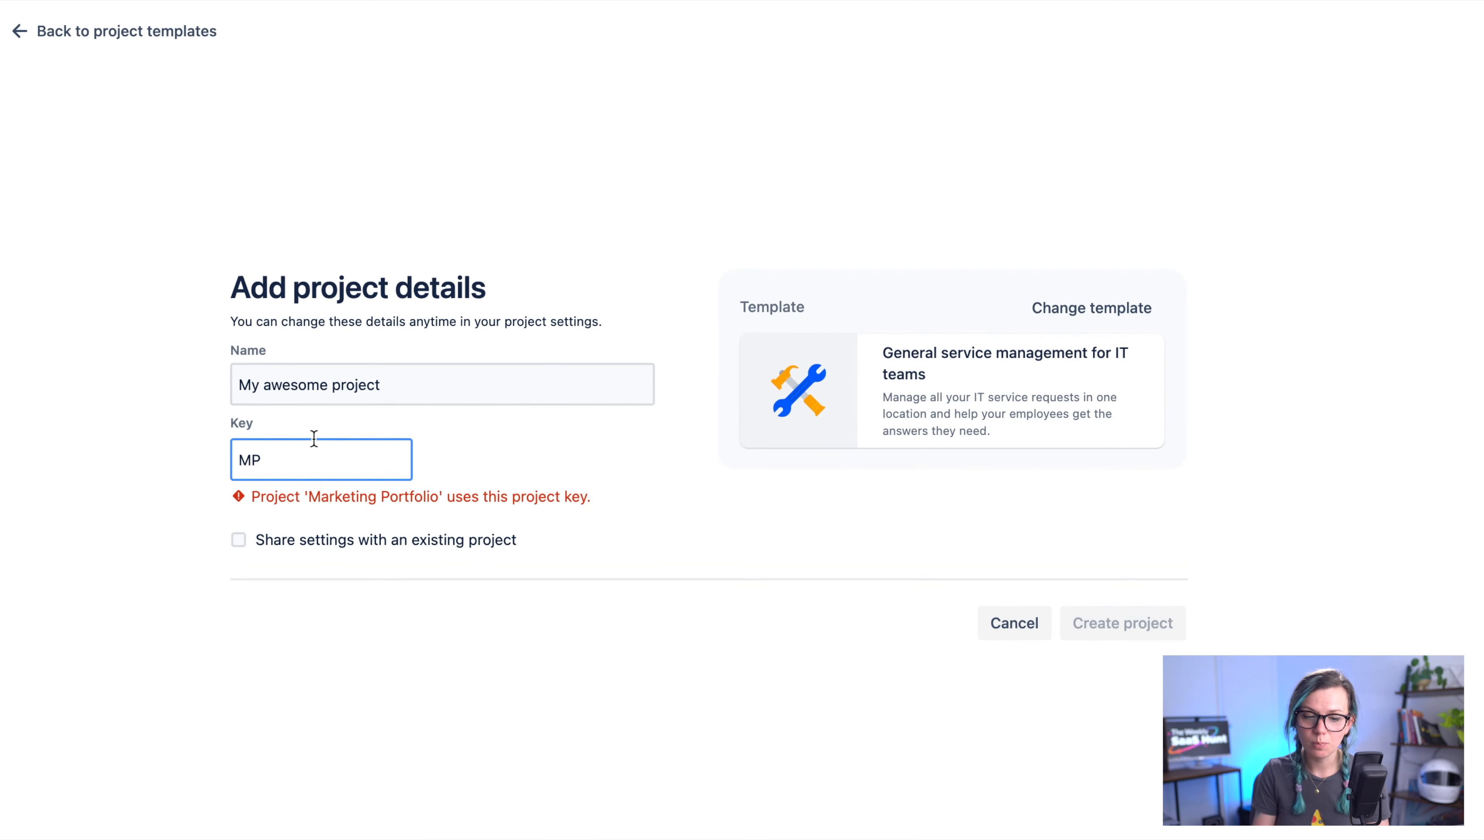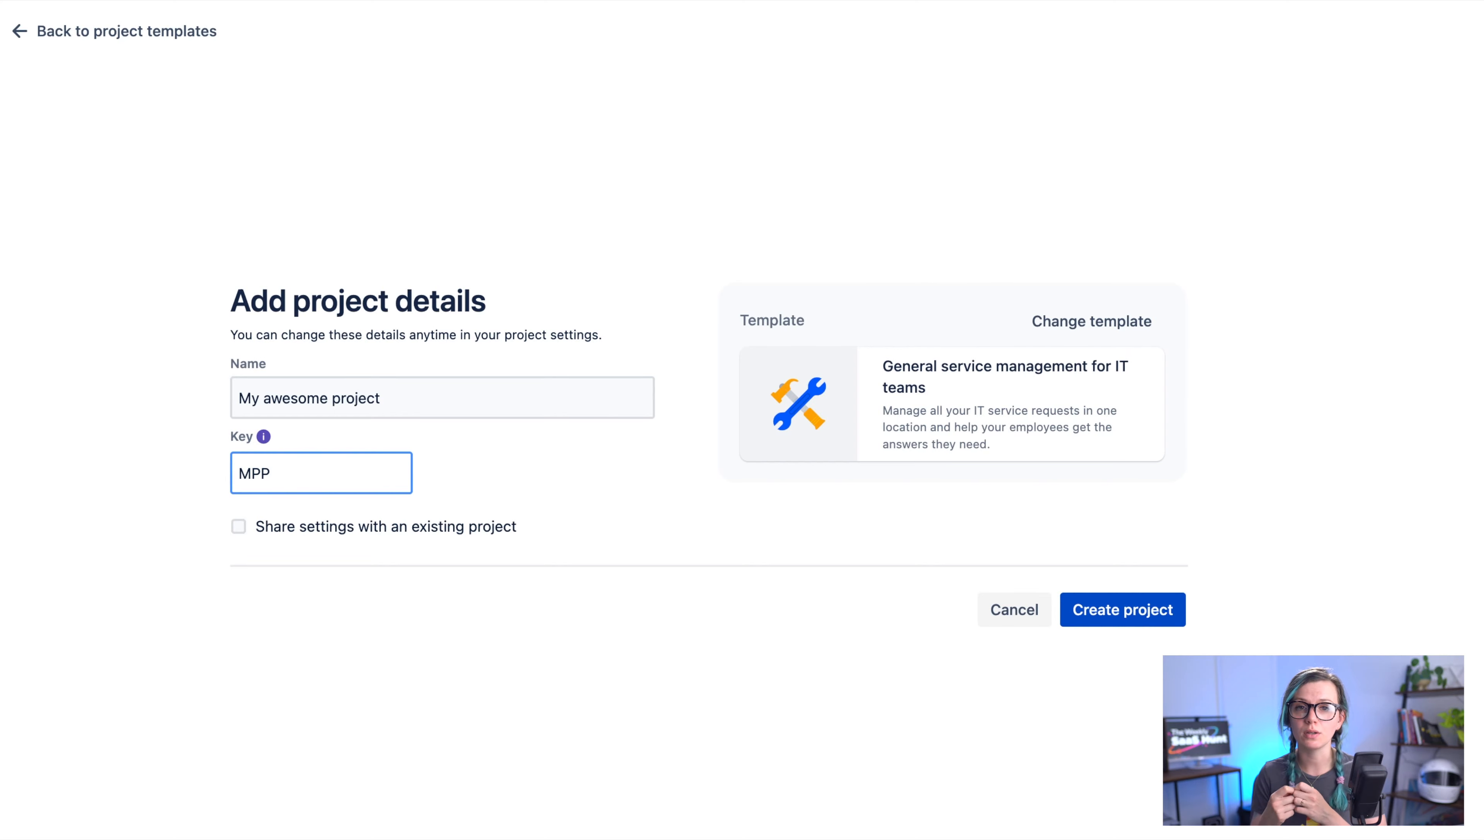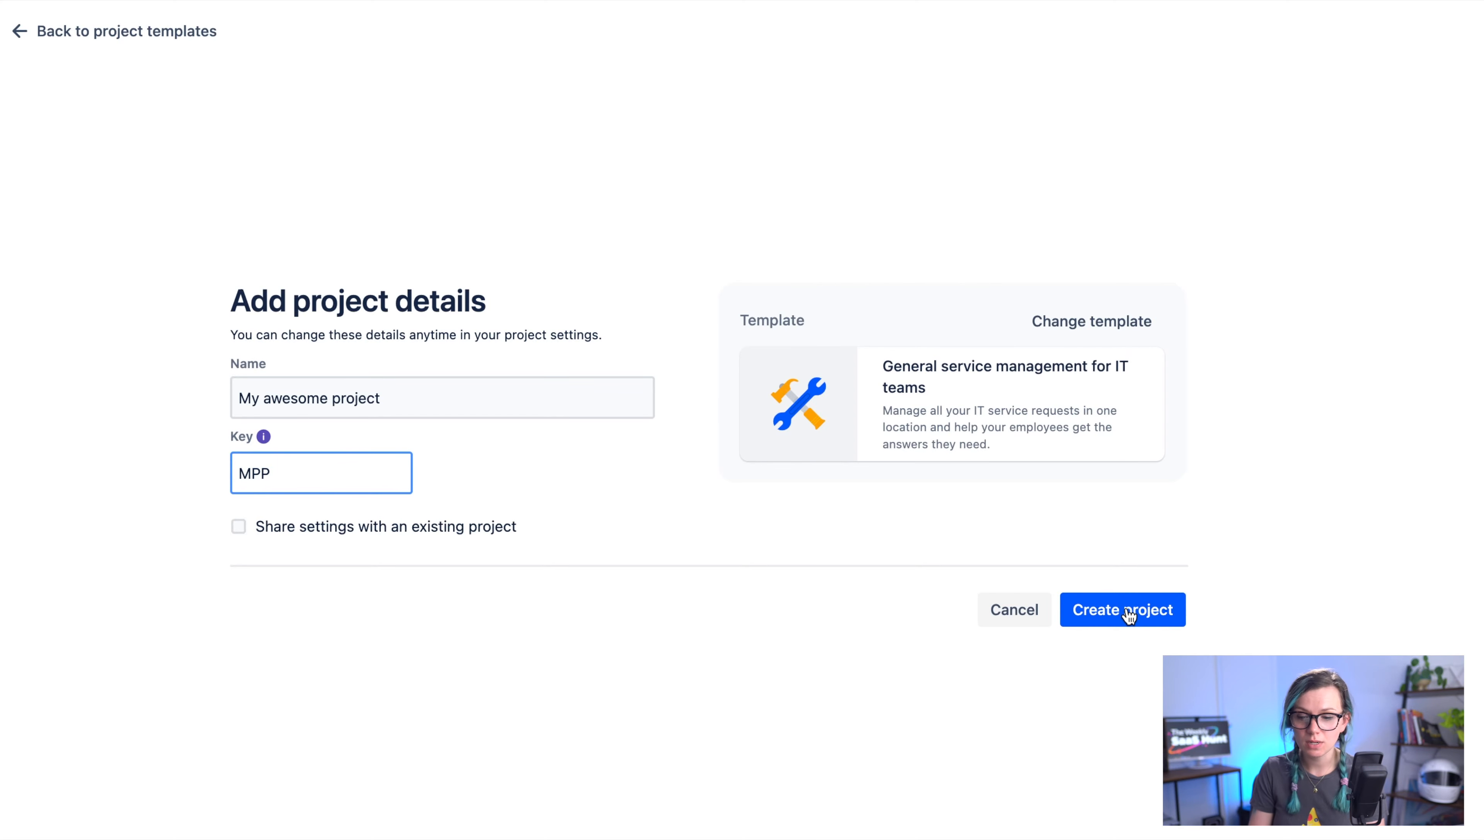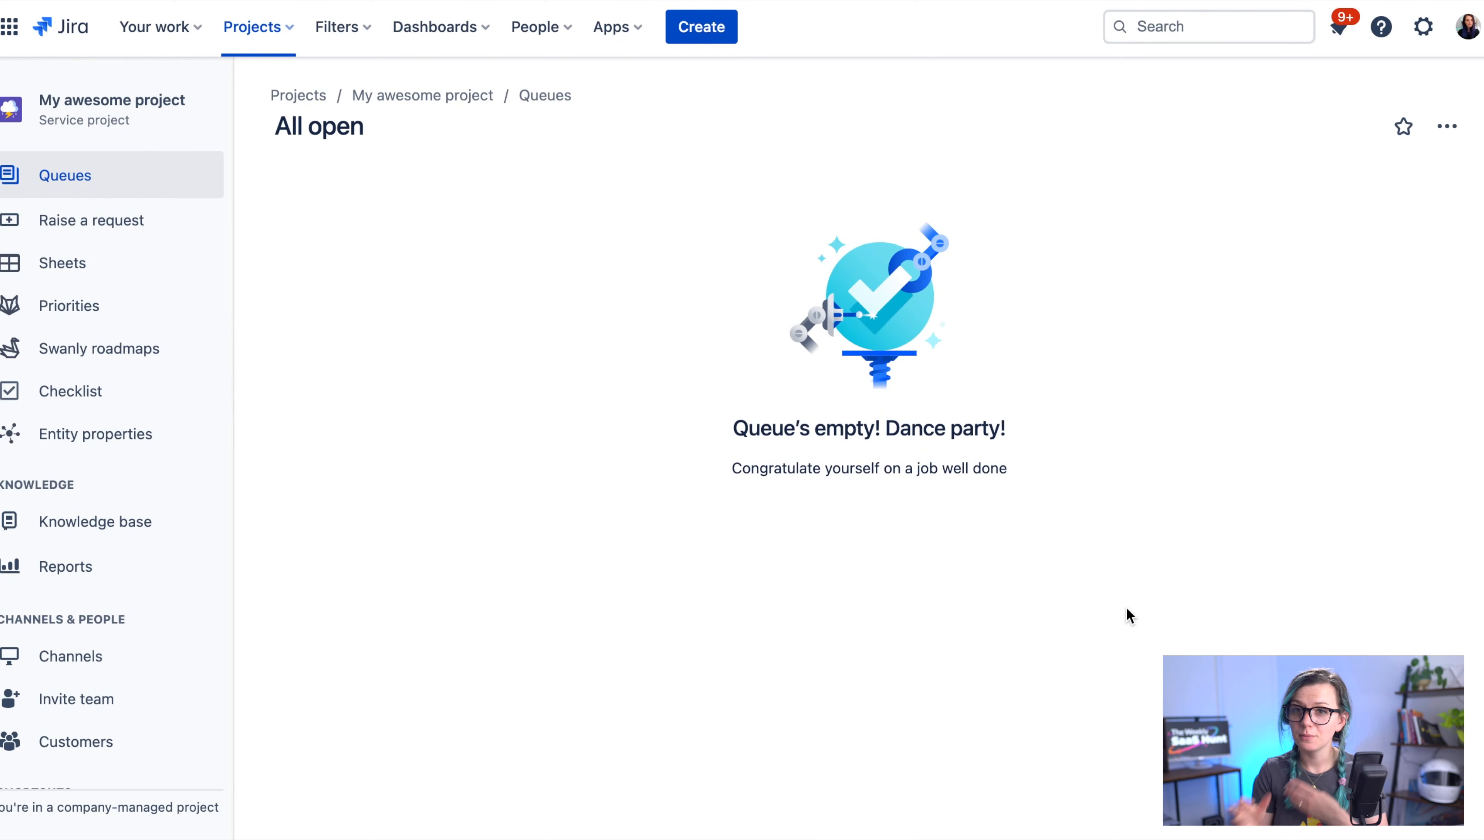The project key is important because all the issues that are going to be created in this project are going to be tagged with this project key so it's an identifier of that project for you as well. And then once you're ready you can click on create project and the project is now created for you and it's ready to use.